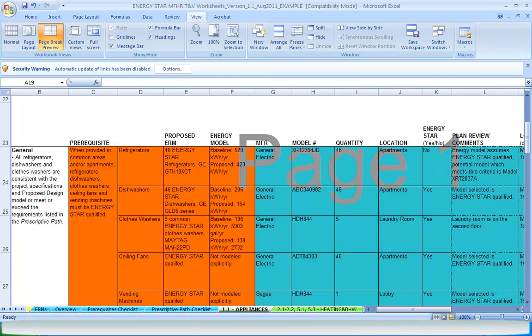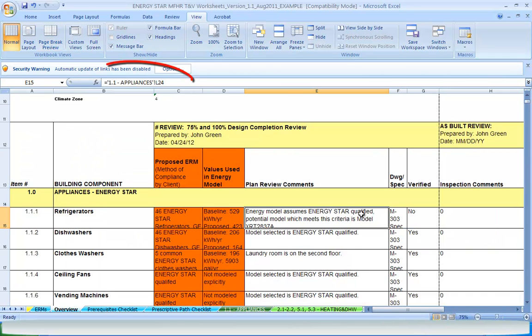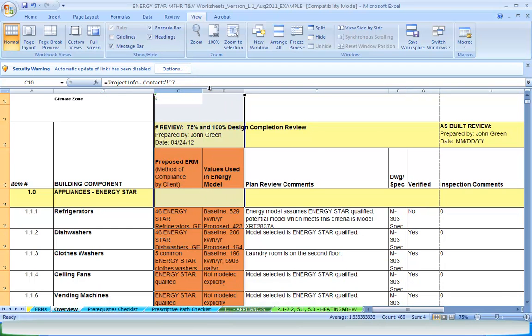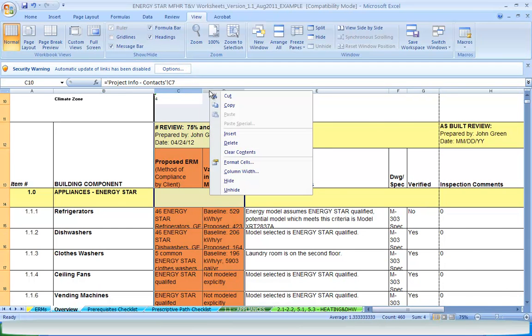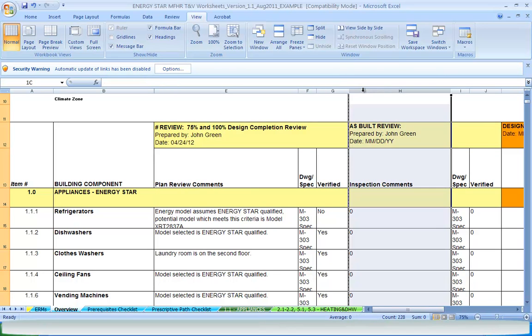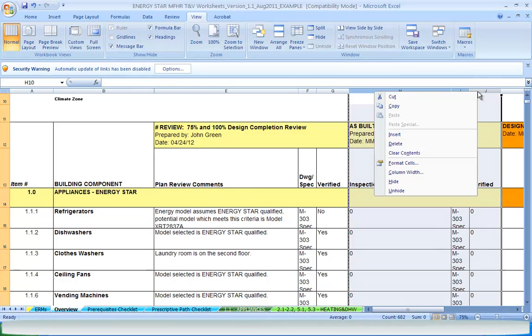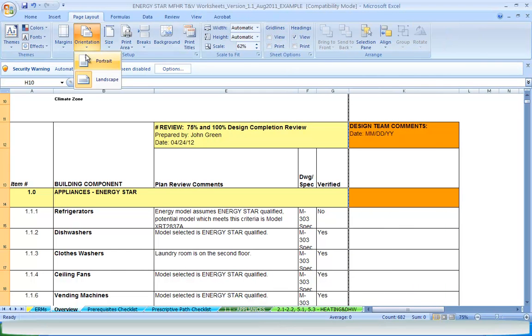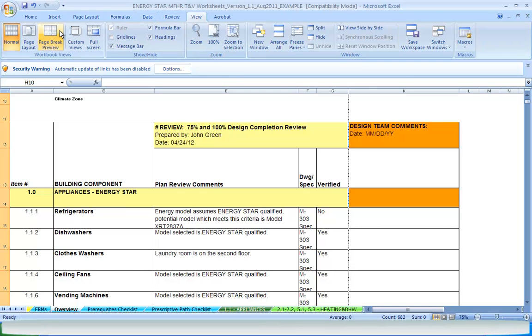After the construction documents have been reviewed and feedback provided in the TNV worksheets, it is linked back to the overview tab, which serves as a summary of the plan review. The next step is to either make revisions to the modeling inputs and/or provide feedback to the project team on how to bring the design in line with the energy model or requirements of the prescriptive path. The overview tab can also be used as a deliverable to provide feedback to the project team.